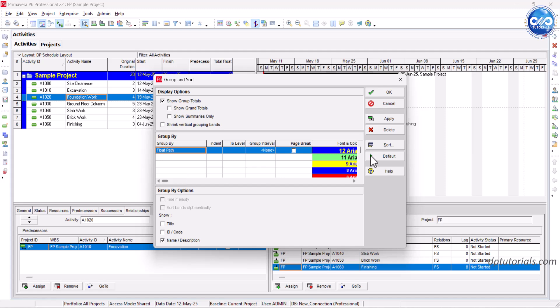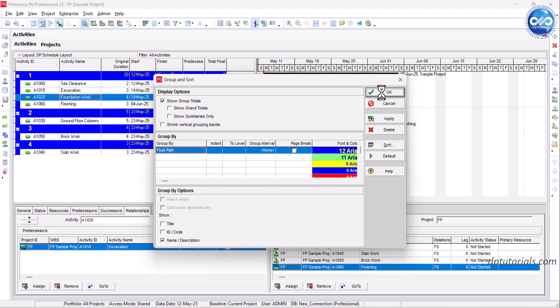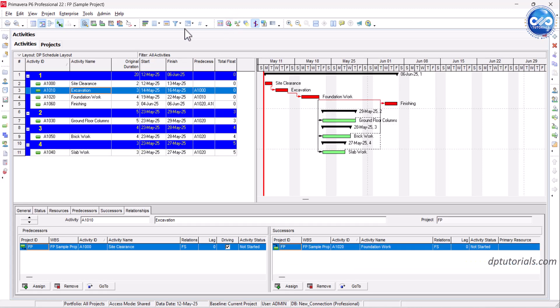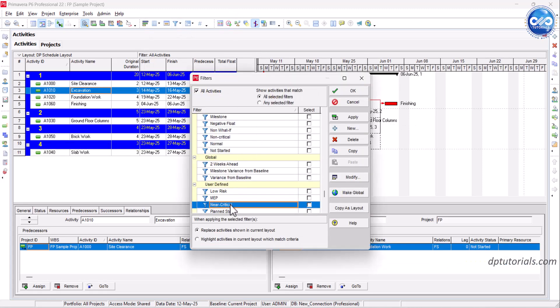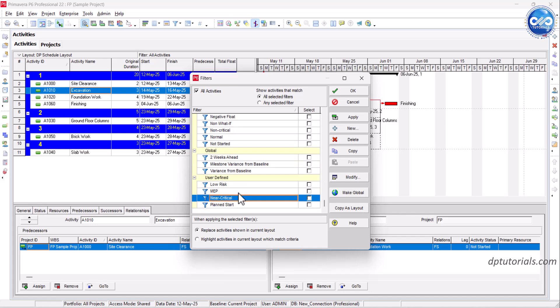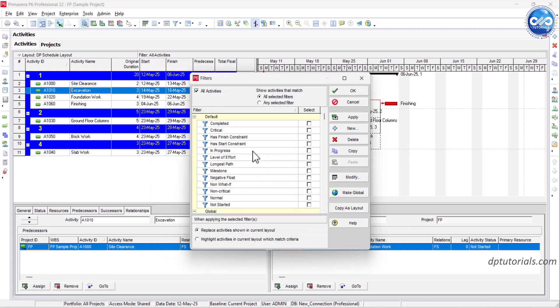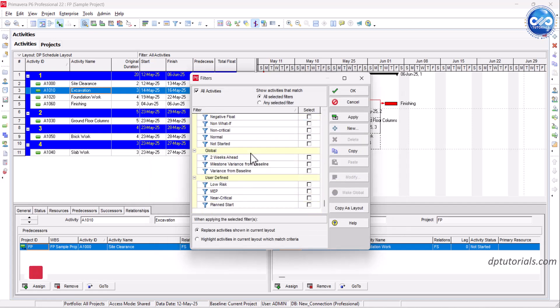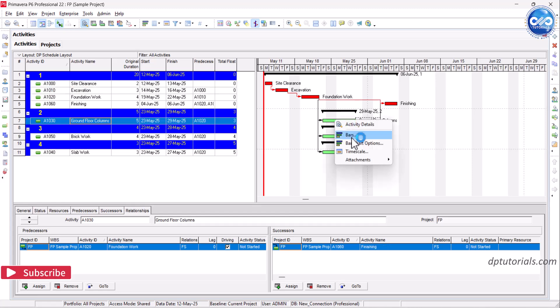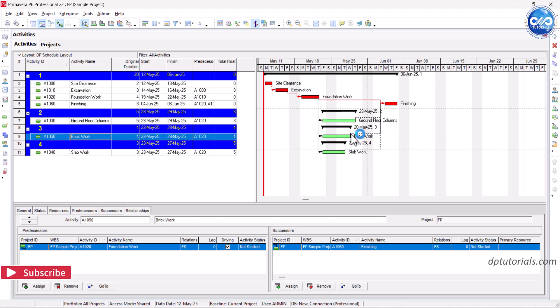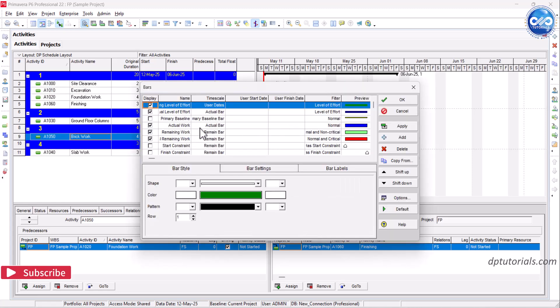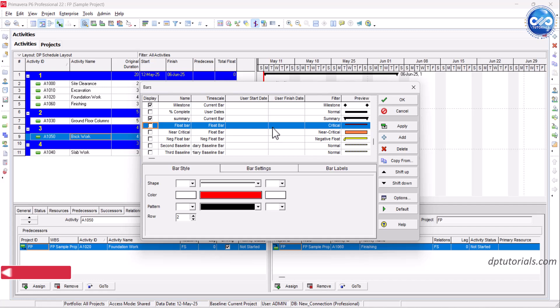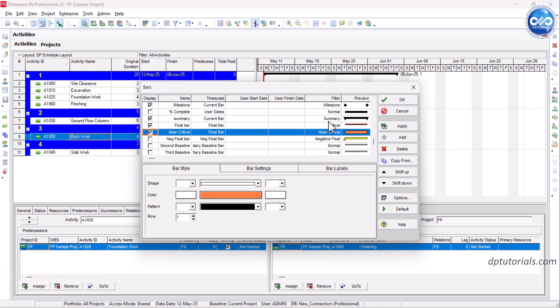This groups activities by their float buffers, that is, same risk zone. Optionally, use filters to highlight float equals zero as critical path, float less than or equal to as near critical, float greater than five as low risk. You can also color code the bars in the Gantt chart using bar styles for even more clarity.